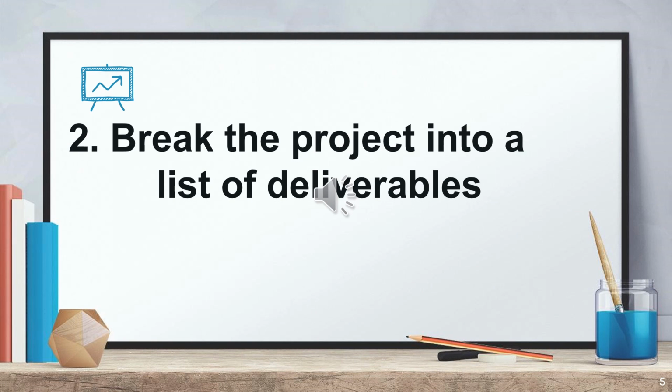Next, break the project into a list of deliverables. Develop a list of all the deliverables. This list should break down the larger project into smaller tasks that can be assigned to specific team members, and you should include estimated deadlines associated with each deliverable or task.